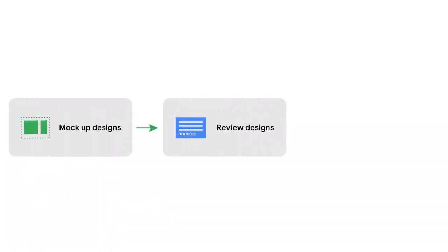This is a perfect time to think back to your work breakdown structure, or WBS, which is a chart that sorts all the milestones and tasks of a project into a hierarchy according to the order in which they need to be completed. This includes a detailed overview of every project task. Then, you determine which tasks on the list absolutely can't begin until another task is complete. This is called a dependency, and we'll discuss this topic in more detail later on. Next, you'll work with your team to make time estimates for each task and map each task from start to finish.